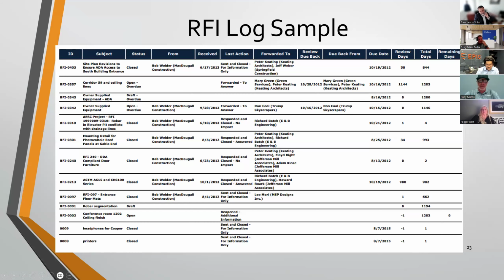But in some cases, if it just kind of goes ignored and I've sent the email and now we're 30 days out, and now I've moved past that section of the building and I didn't get my answer, and then the question comes asked, now I'm submitting a change order because I have to move that swing stage back, which is going to cost me time and material. And now I'm submitting a change order that has to be approved, and now there's an additional cost that could have been avoided. And that's why we put that 5-day maximum on it. And good experienced companies can help execute that perfectly.